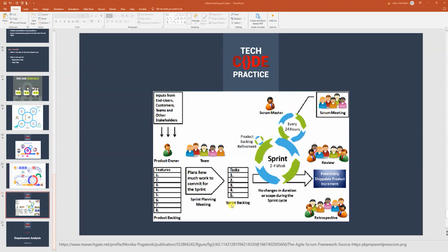So you see we have a product backlog here. You refine it. You see that word, refinement. Remember, you must have a refinement before you have a sprint planning, because if you don't, nobody understands what we need to do. You cannot just tell us to test or build a registration page. What are the requirements? That discussion happens during the refinement, and everything else here is stuff we have already talked about. So, any question before we go into our real implementation? So we see how it works.